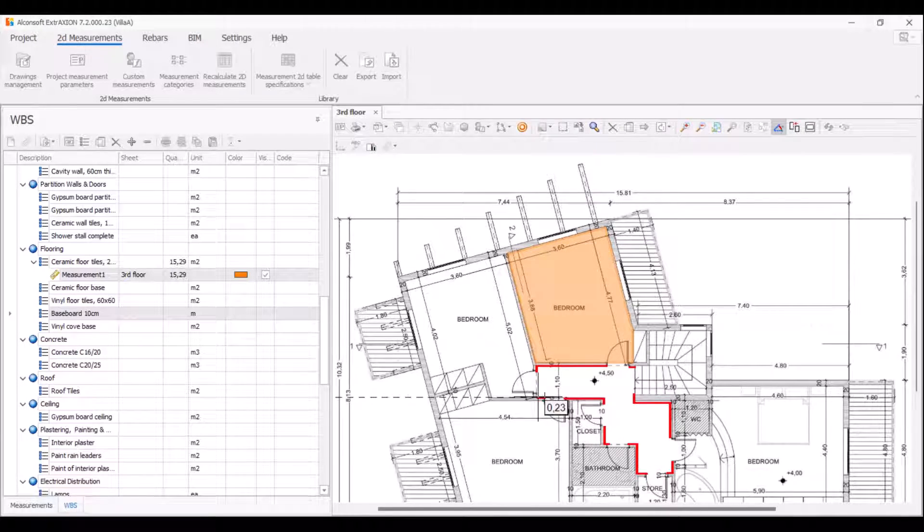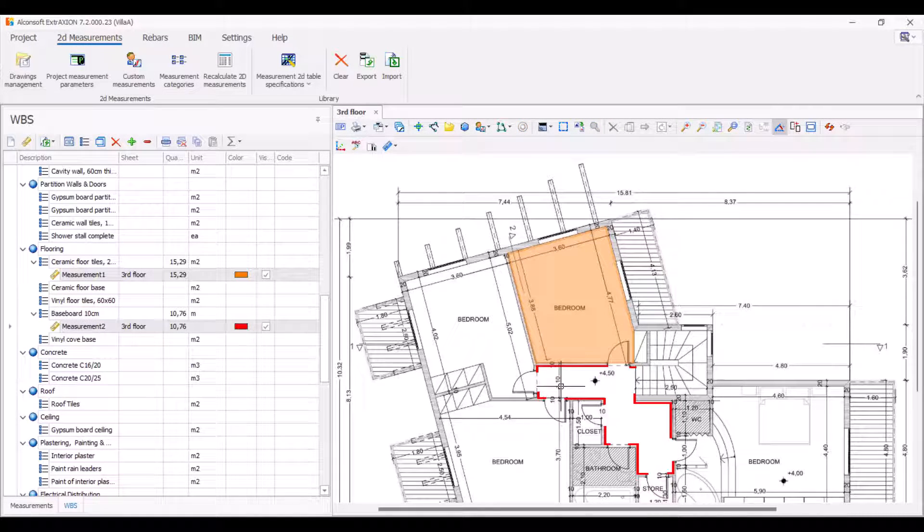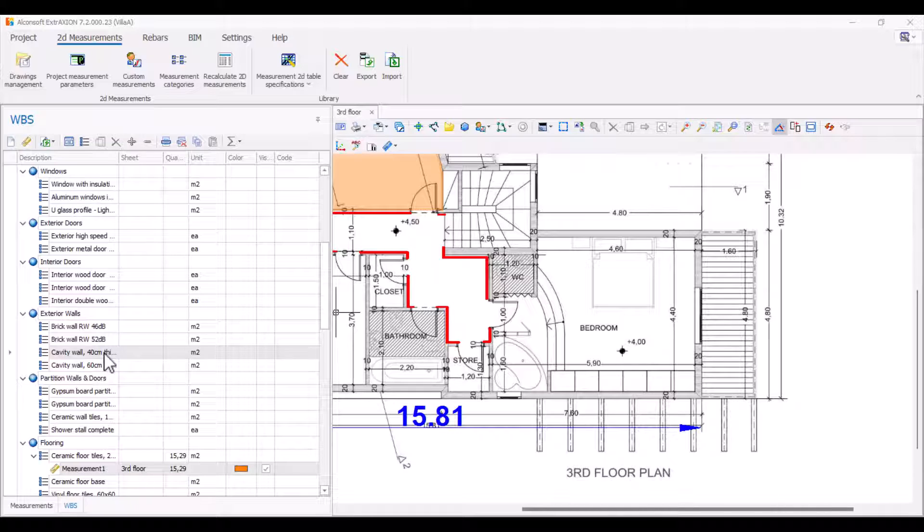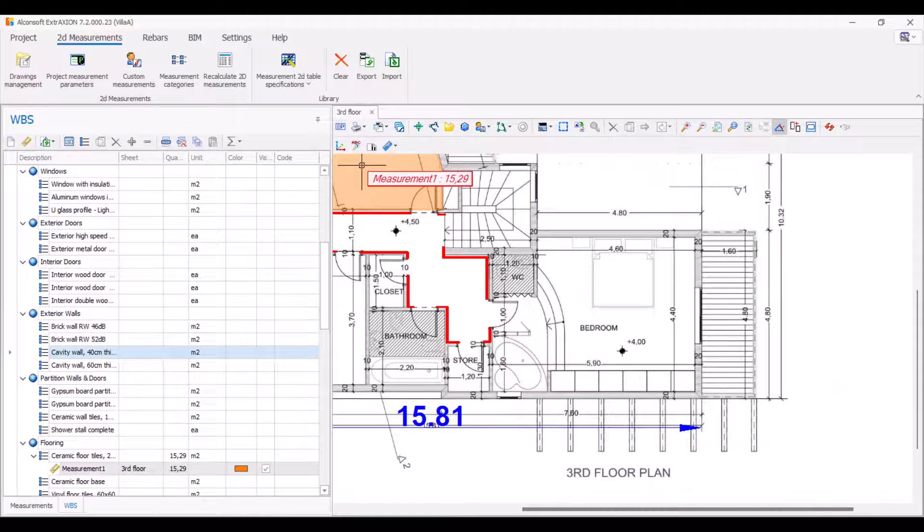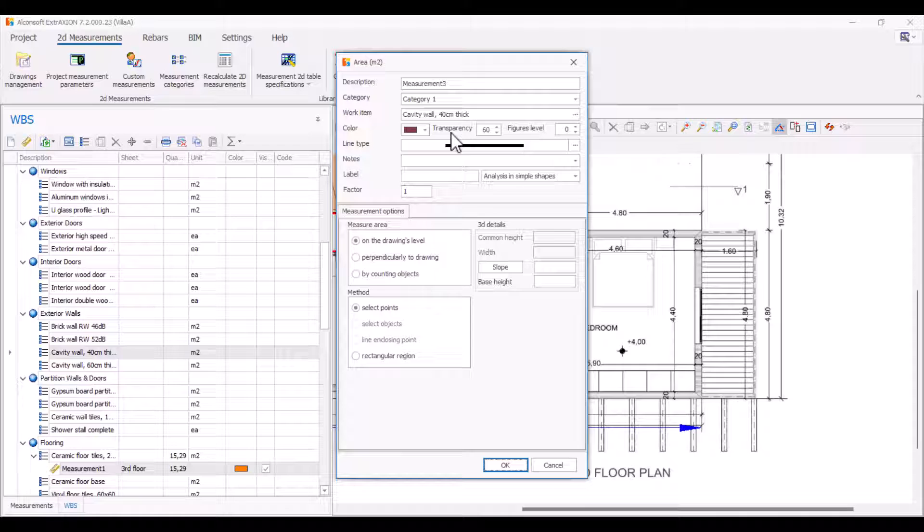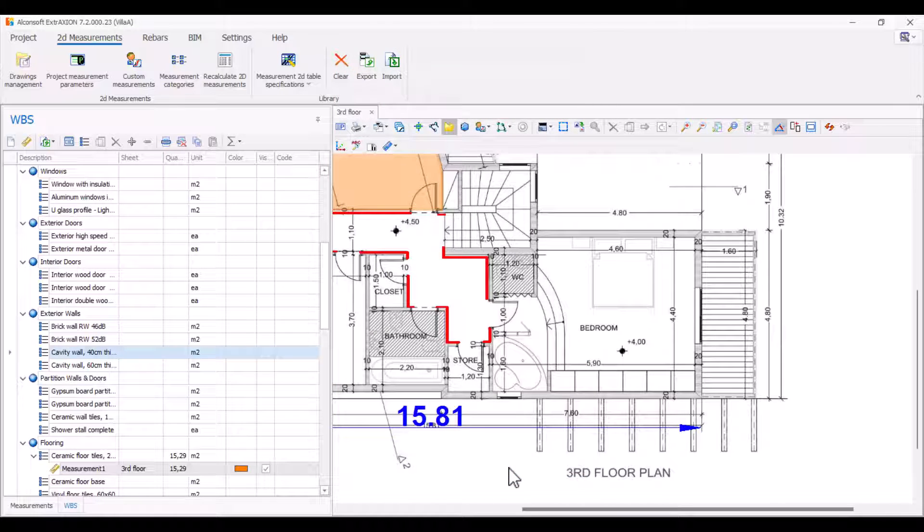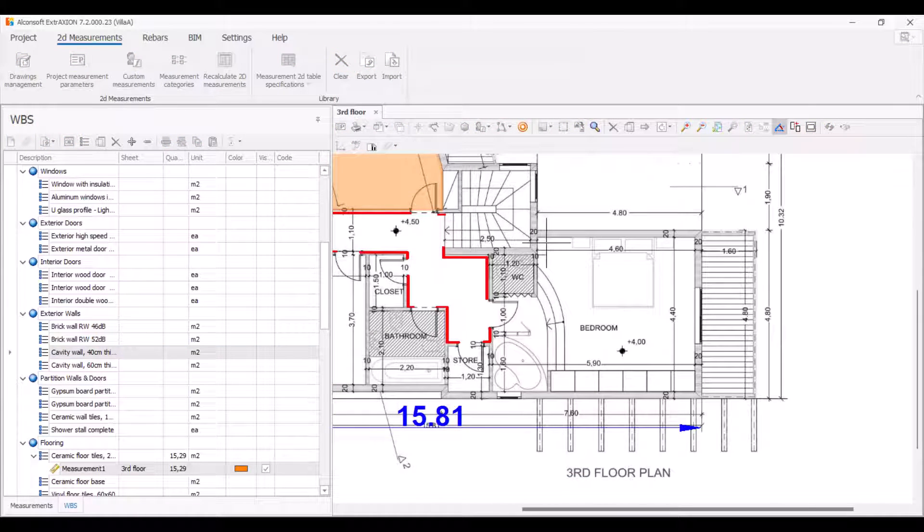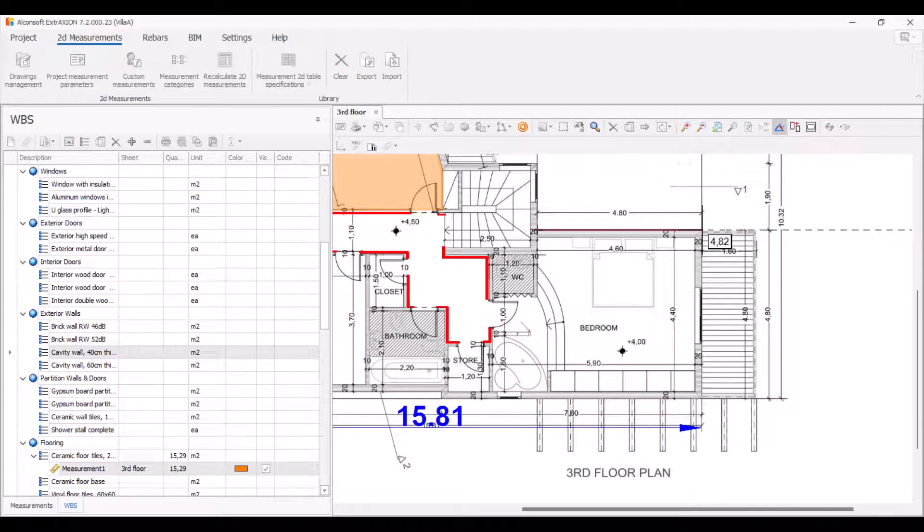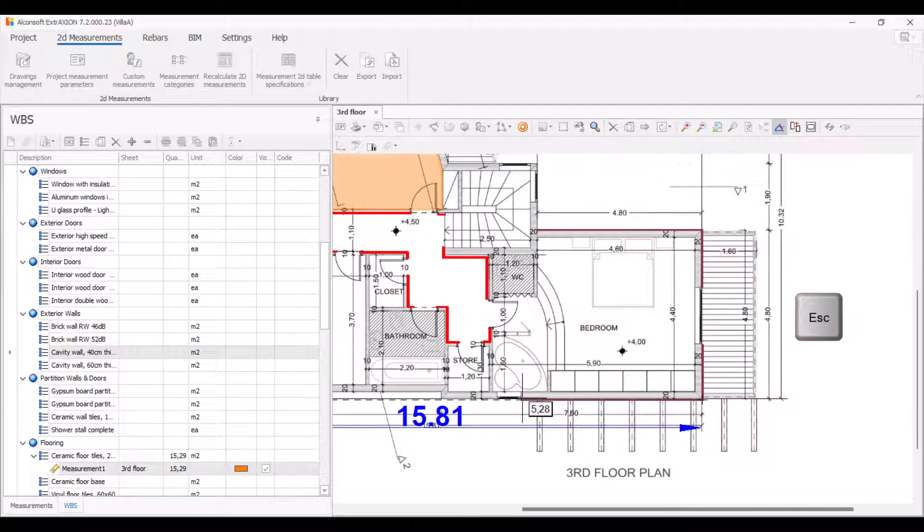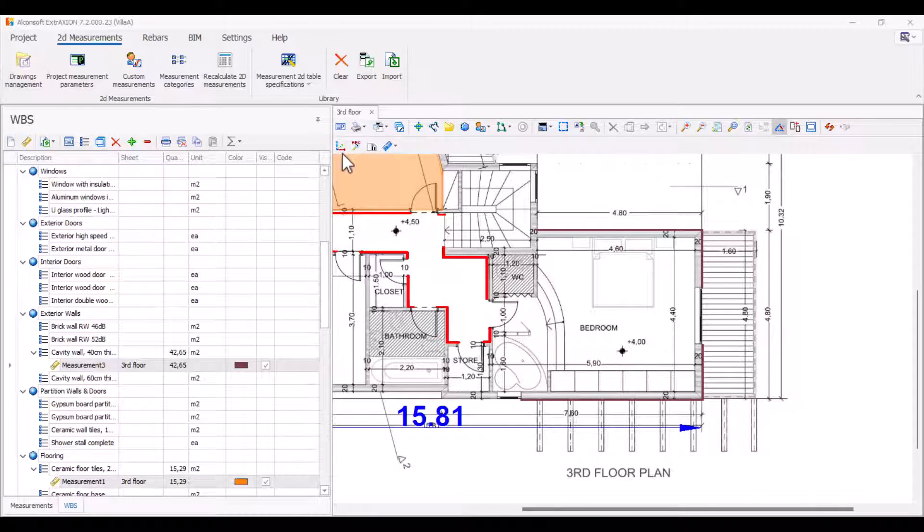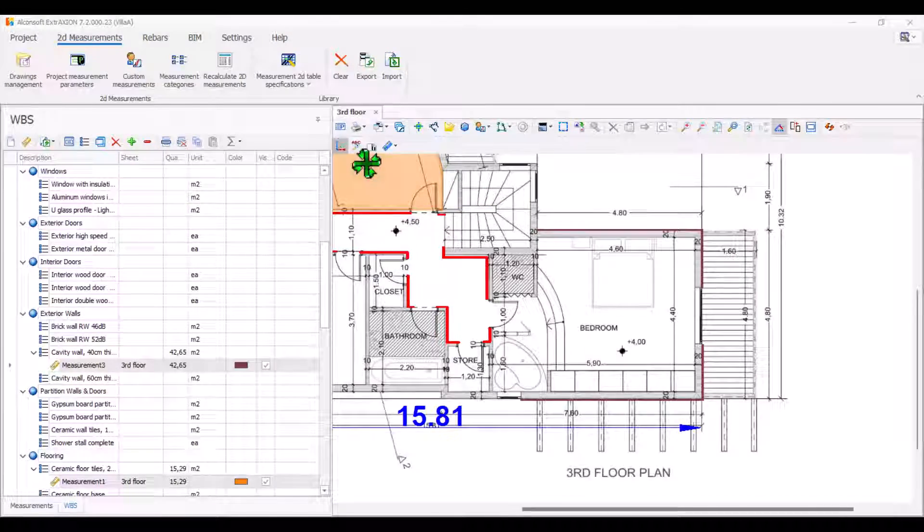You can also make measurements that can be shown in 3D, like measuring the surface of an outer wall. In the window that appears, select perpendicular to drawing the frame, set a common height like 3.20 meters, and start the measurement by clicking on the wall corners. Complete the measurement similarly and observe it in a 3D visualization.